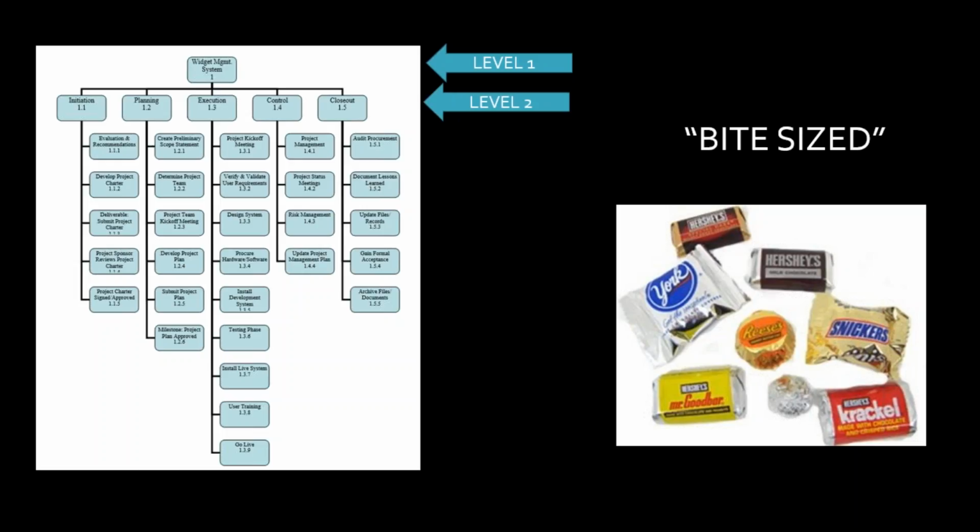And again, this is much like project life cycles. Remember, I showed you that life cycles are particular to your project. So that first breakdown from level 1 to level 2 is a pretty important decision for you. There's no rules here about what should be the second level. The second level should be reflective of your project. So if that project life cycle that I showed you earlier, design, test, rollout, all that works, then that should be your second level. Think about this. You're going to continually decompose each level down so that you don't miss anything in scope. So if the project life cycle is the best use of level 2, then use that.